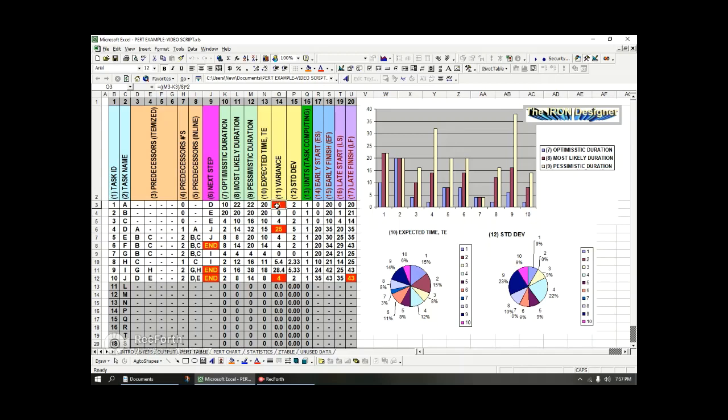Again, this is just statistical analysis. It's just the statistical definition of how they want to define the variance, okay? So it's taking the extremes, dividing by 6, and then squaring it, okay? Now the standard deviation is just taking the square root of the variance, okay?